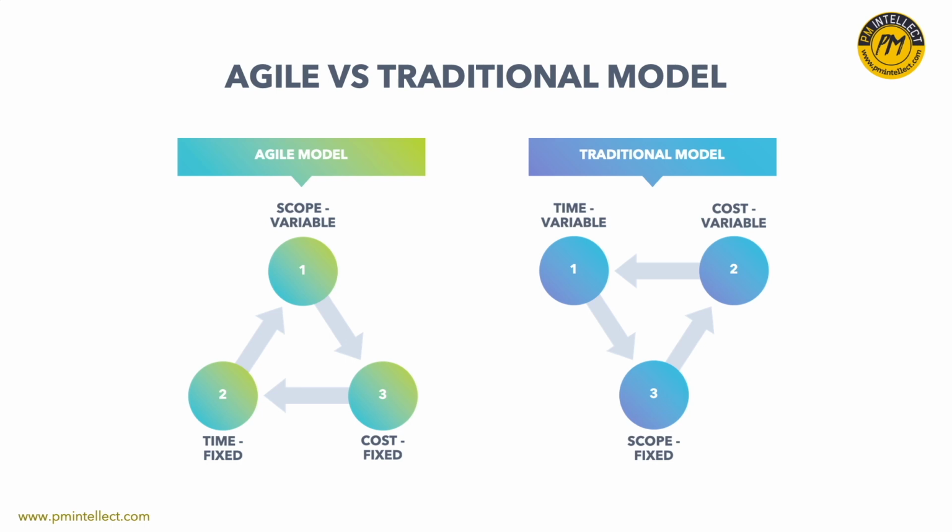Now, this also calls for criticism as it cannot be the best way to deliver construction projects. Those need to be completed to the defined requirement and might be useless if partially delivered. In those cases, the traditional or waterfall approach would make a lot more sense. But knowledge work benefits a lot from the agile approach as the end product can be first delivered and then improved by each iteration or sprint as we call it.